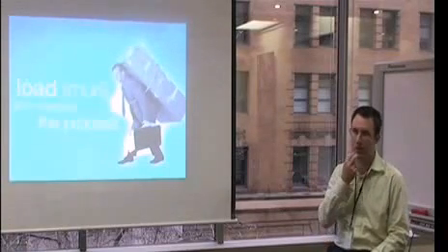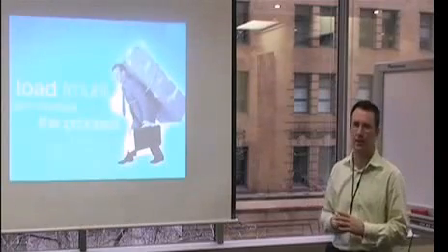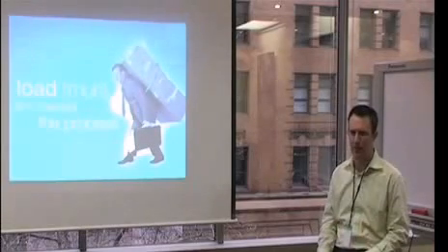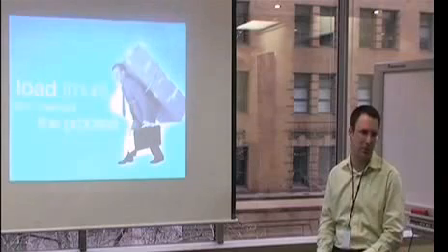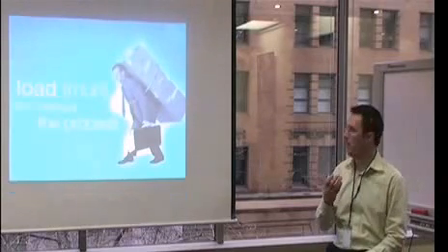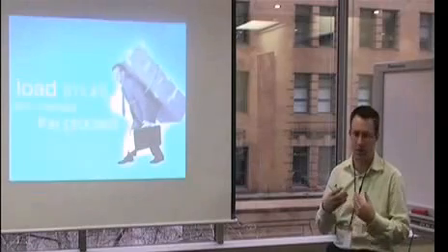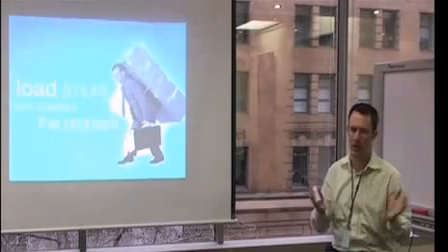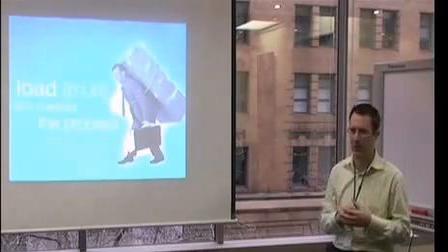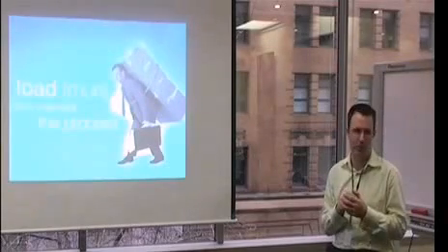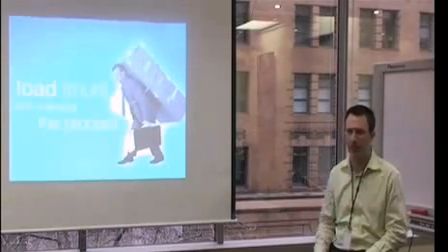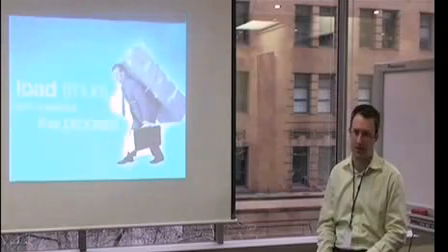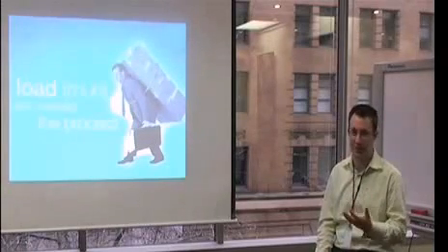I'll give you a very good example. My current client, when I went in, had this consensus paralysis. Everybody had to be in a room and everybody had to agree for anything to be done. And if they weren't in the room, they'd have a second meeting where they went and reminded them. I basically said the load on meetings within this project was enormous, and they didn't realise that having 12 people in a room was X amount of money. And I said, you have 6 of my team in a room 4 times a day, all roughly about an hour. So my progress can only be measured by 50%, and we're on time if you go by that. And that was how I changed the behaviour, because that was unacceptable.